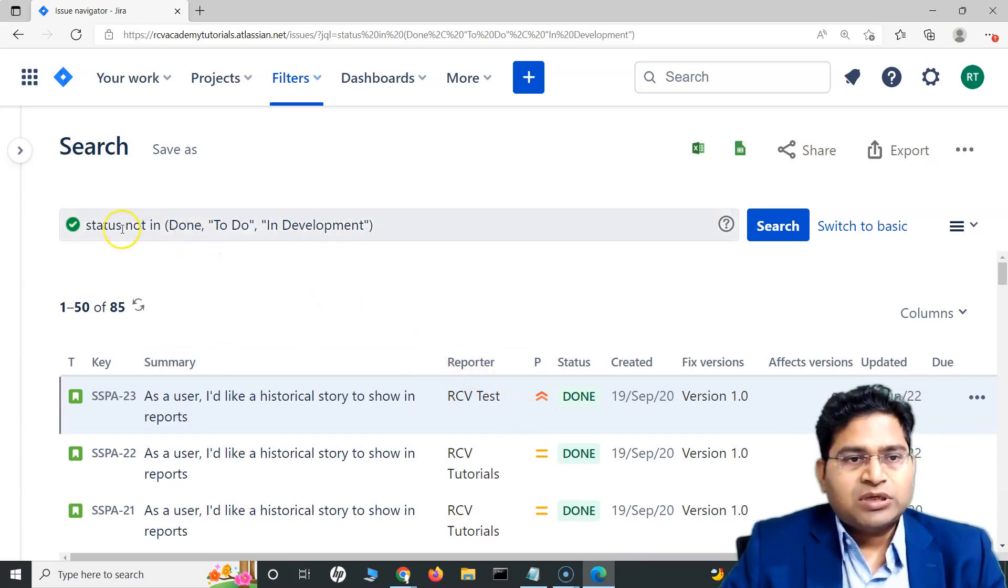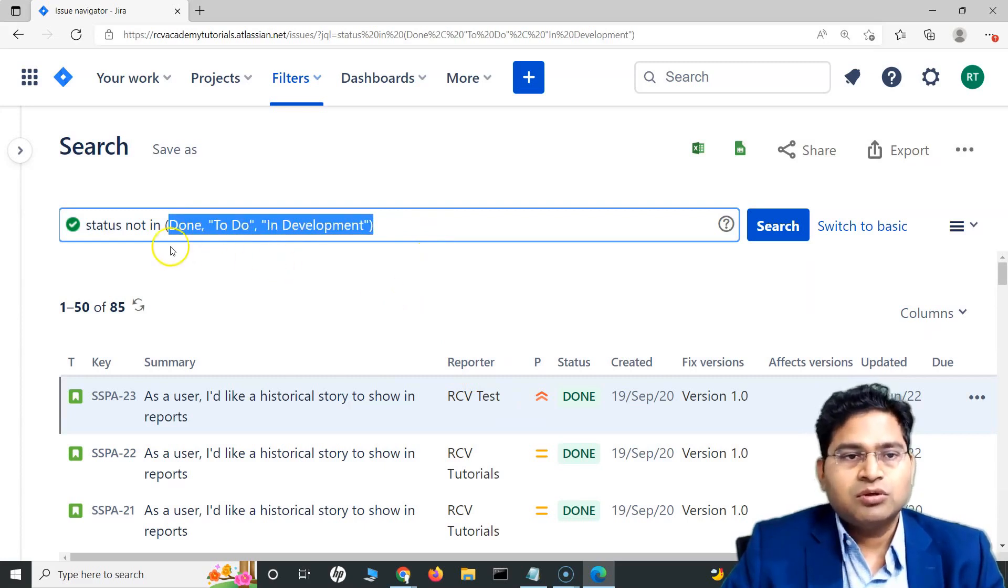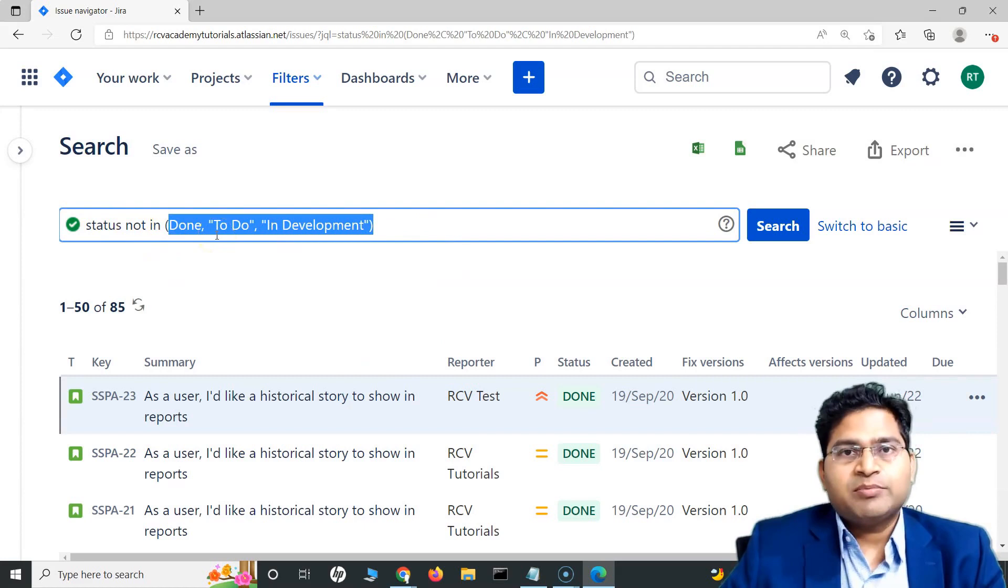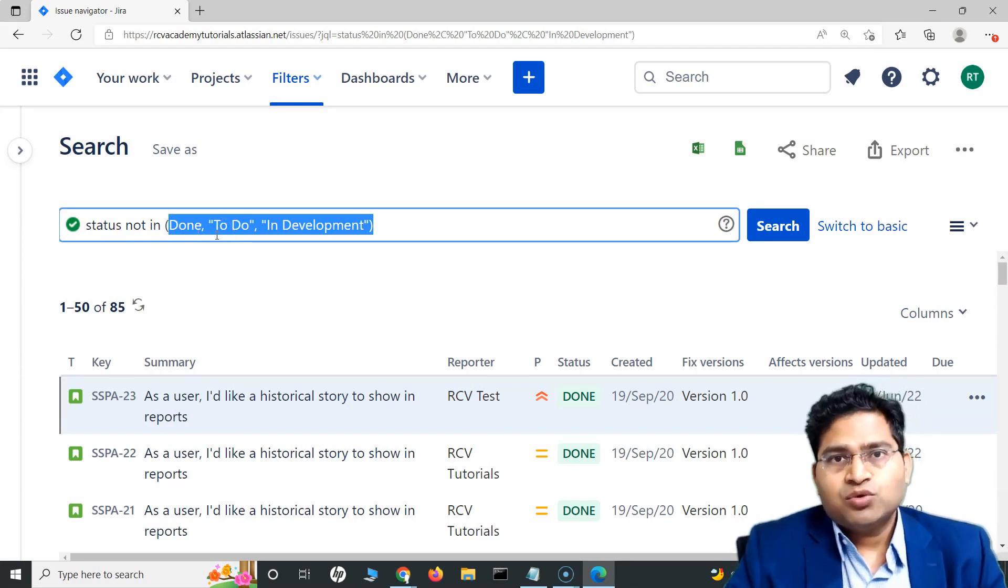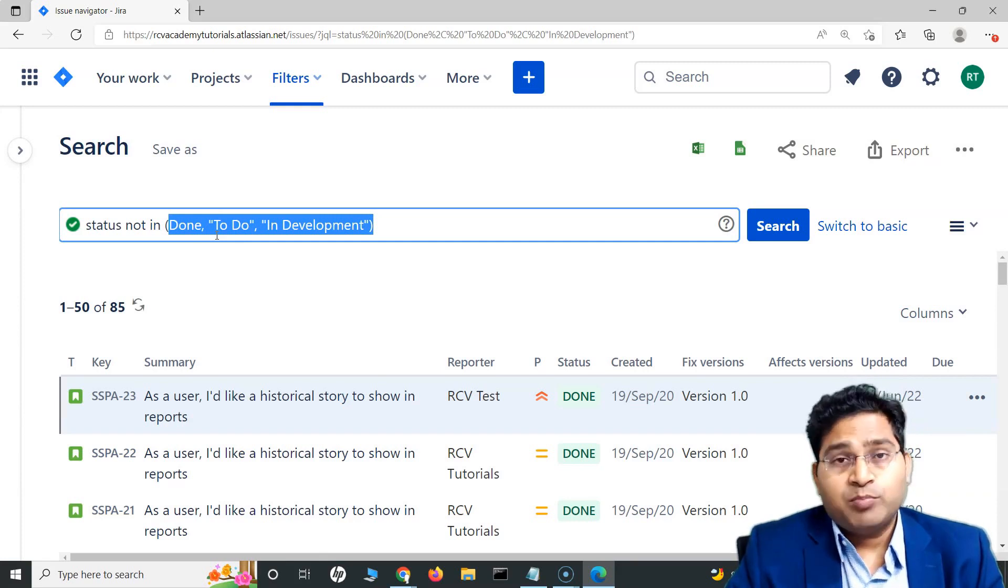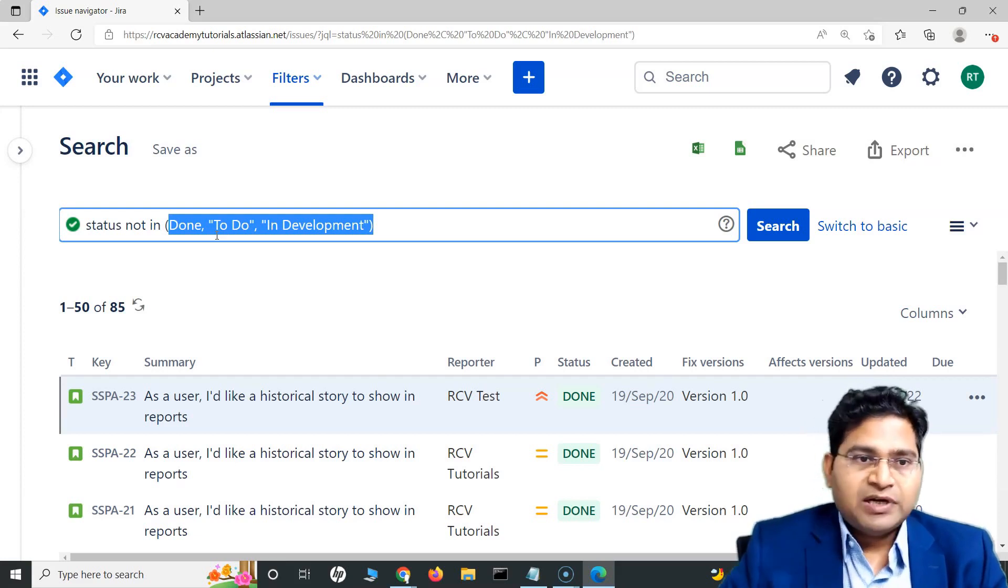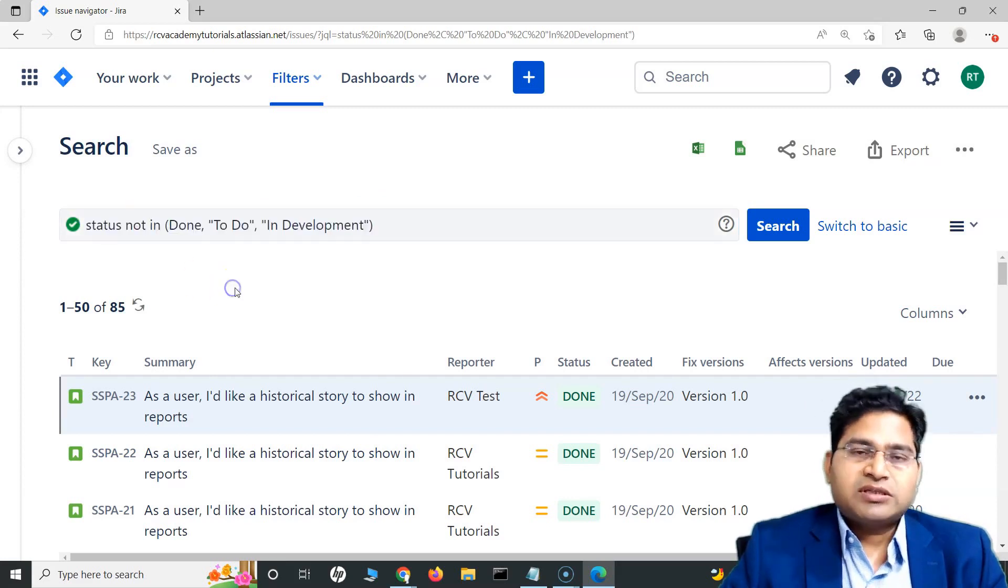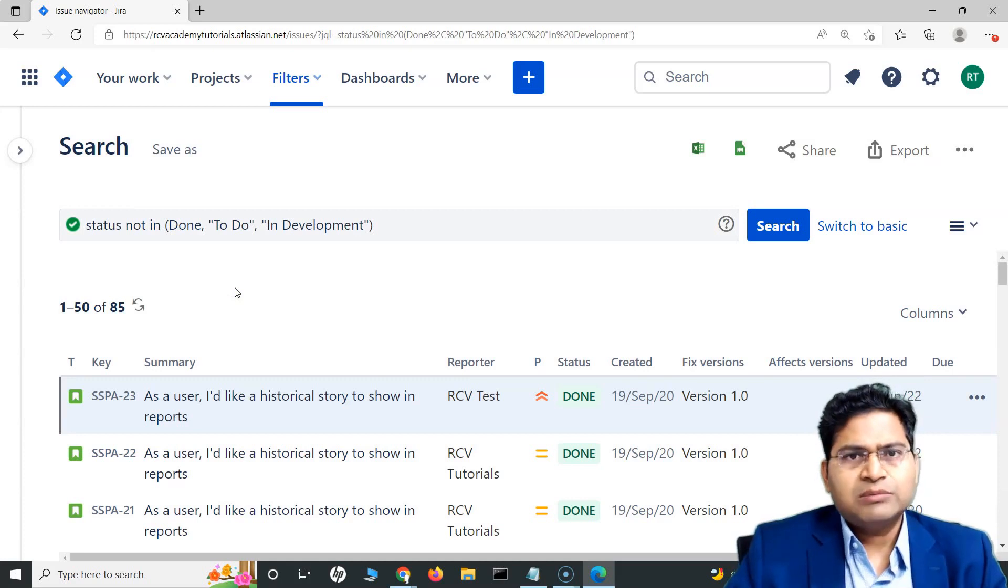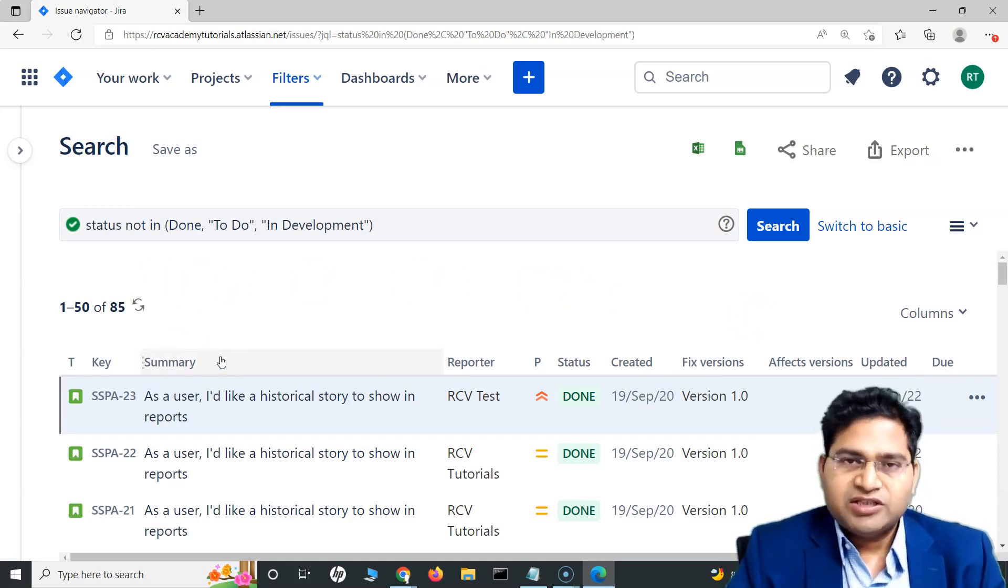For example, you can use it for not only for status, you can use it for the user. Where the reporter in and then you can specify comma separated reporters. For example, you are looking for the defects and defects are usually reported mostly reported by the tester or testing team. You can say type is equal to bug and reporter in and then comma separated, you can specify the username of the team members of your testing team. These are some of the real use scenarios of the in and not in operator. You can literally use them with any fields and values that you can think of in Jira and JQL.